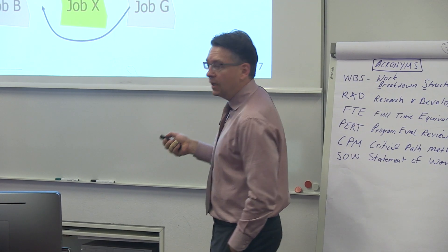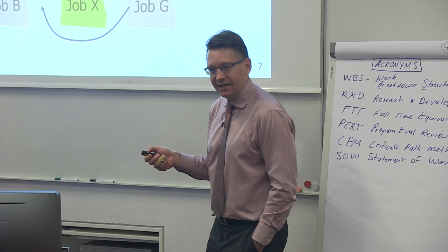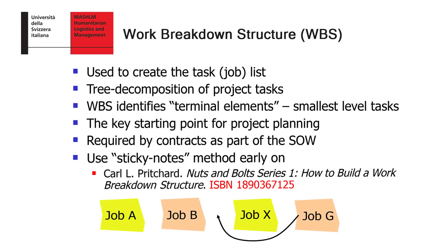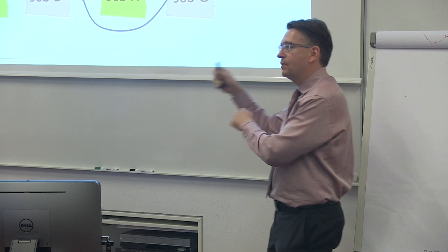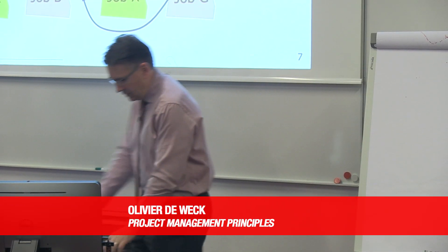How do you come up with a work breakdown structure? That's the big question. I call it the sticky note method. The idea is that you put each job or each task on a sticky note, and then you can move them around and organize them.